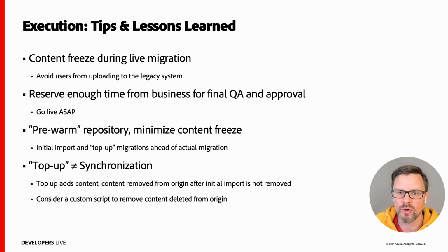Make sure, though, that all project members understand the difference between a top-up and a sync. A top-up usually only adds new assets and maybe changes to previously added assets. It does not track assets that have been removed from the original, and it is difficult to keep track of assets if they have been moved on either system. If that is a requirement, extra coding might be required to do some cleanup after the migration.